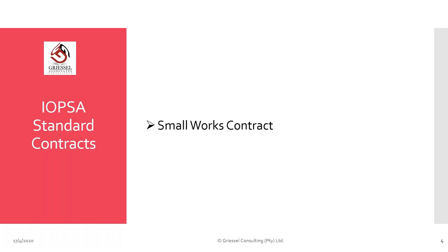It mostly refers to contracts where you do not have total control over the site. Whilst the minor plumbing works contract is for larger contracts where you are the main contractor, and where, although there's no principal agent involved, there will be requirements for securities and retention, and not a case where you will, for instance, just ask for a deposit from the client.